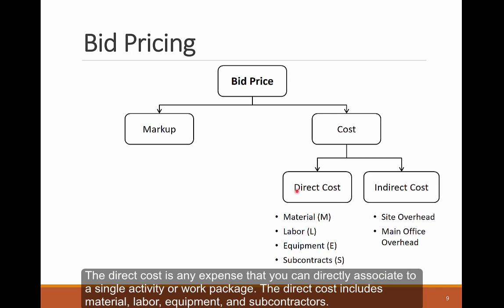The direct cost is any expense that you can directly associate to a single activity or work package. The direct cost includes material, labor, equipment, and subcontractors. For example,